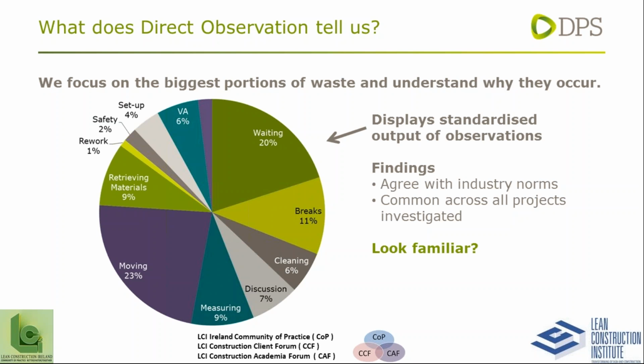Actually, John, I'll come in on that one. When we get onto the productivity improvement roadmap, which is basically the root causes of why we're seeing things like 20% weighting and 23% moving, the level of work required to make that corrective action may need a value stream map. It may need a Kaizen event. It could be a just-in-time implementation. So depending on the magnitude of the change required to implement the corrective action, you'll use various escalation levels of problem-solving methodologies.